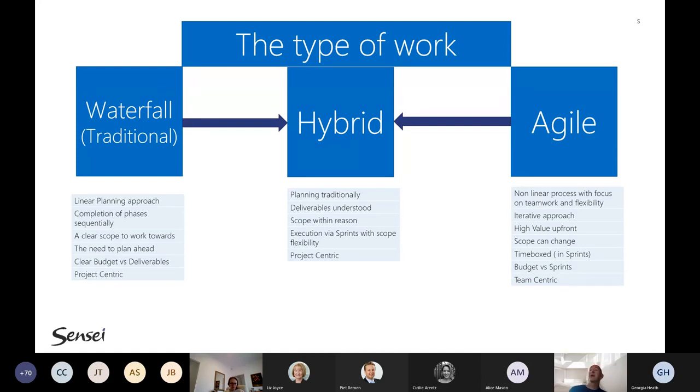All right, so that's the type of works, and really from a scheduling perspective, the ability for us to determine that. It's interesting, you will find that a lot of schedule tools, and I'm going to refer to them these days as execution tools, are actually not just scheduling tools. They are executing the project. You will find that there are a lot of features that we traditionally knew about that are just not forming part of a new execution tool. A classical example is a baseline. In an agile environment, you don't have that concept of a baseline, because you don't actually have a detailed work breakdown structure that is completely structured throughout the entire project. And what I'm going to do is I'll show you a couple of different execution tools so that you can see what that actually entails.